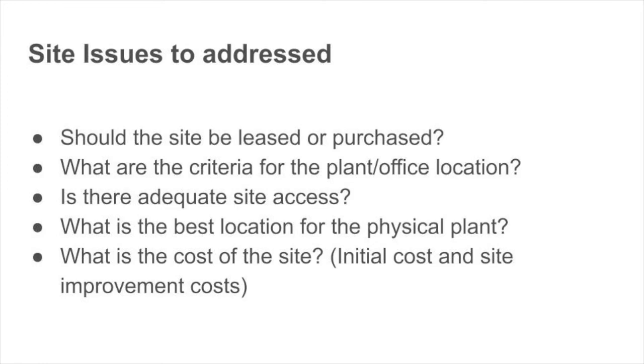What's the cost of the site? Oh, you think about land. Well, not only land. You say, well, rural Newfoundland land is fairly inexpensive. Fair enough, it is. What does it cost to make that land workable? If it's all on rock and you have to blast, or if it's all on sand, it's not the best place to put a building. So you have to ask yourself, how much does it cost to make this site ready? It's one thing to say, okay, this is a good site. It's another thing to say, how much does it cost to make it ready?